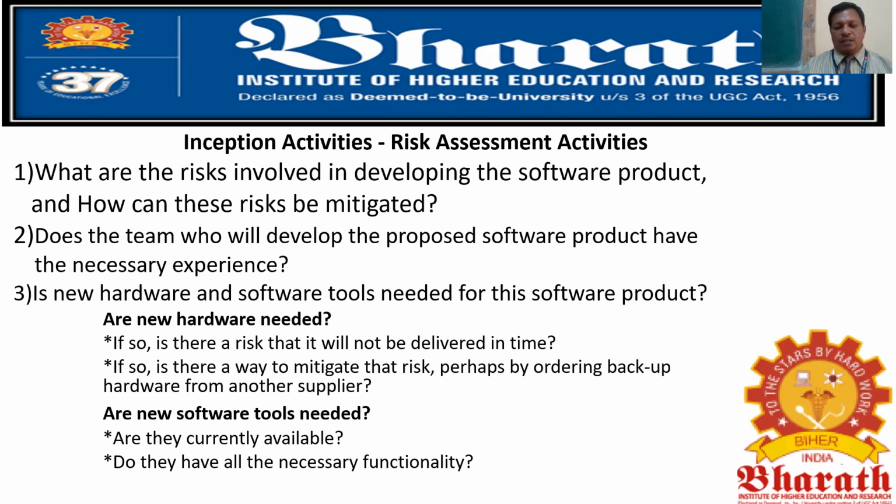These are all one kind of risk. If he is not technologically well versed, you have to train him. Within the available time, you cannot give training and then develop the product. So if you have people experienced in the technology, you can directly place the development activity with the help of the person who is sound in the technology.